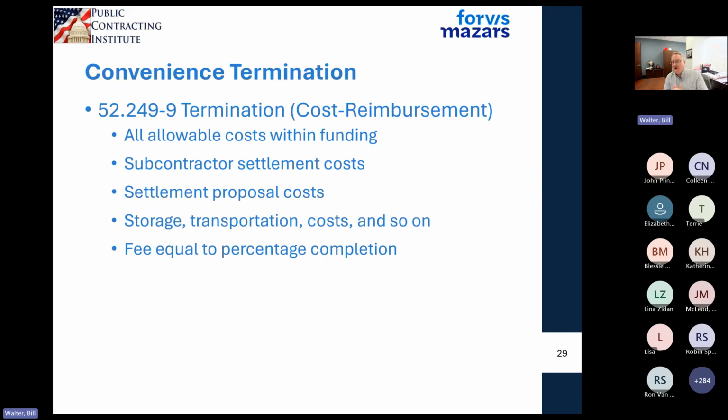Contracts get terminated. We all heard about DOGE earlier this year. And if a contract is terminated, if it's a cost reimbursement contract, there's a clause in your contract, 52.249-9, that says that in the event of a contract termination, you're going to spend the next 6 months billing out the costs that you've already incurred. So whatever costs were incurred up to the date of termination, you place purchase orders, you have material coming in, you've got payroll that gets paid 2 weeks later. All of those costs will hit your books, they'll hit your job costs, and you can bill the government.